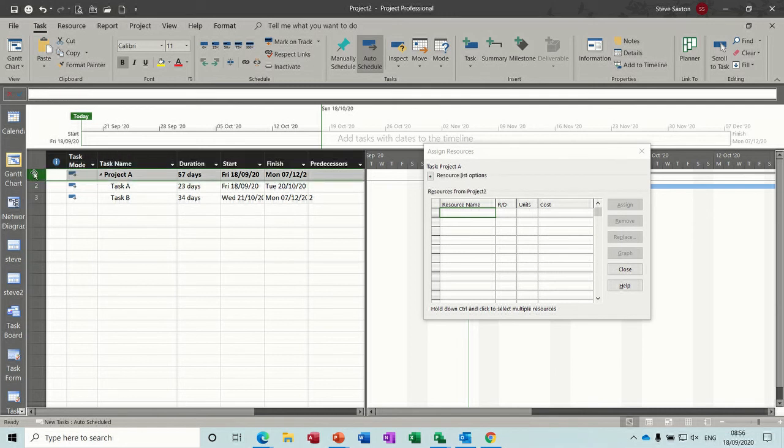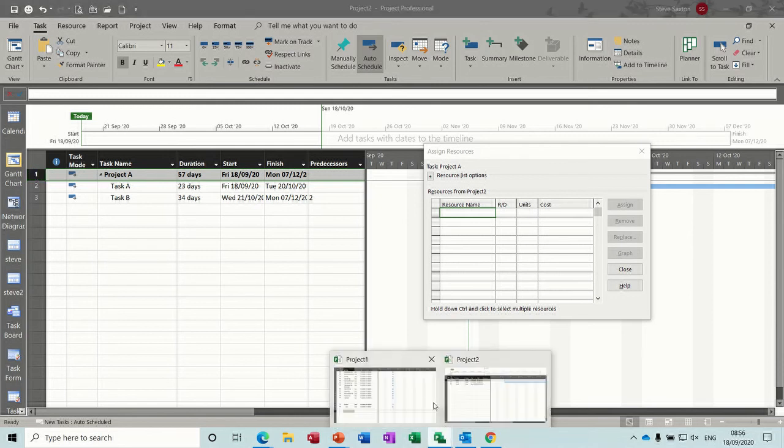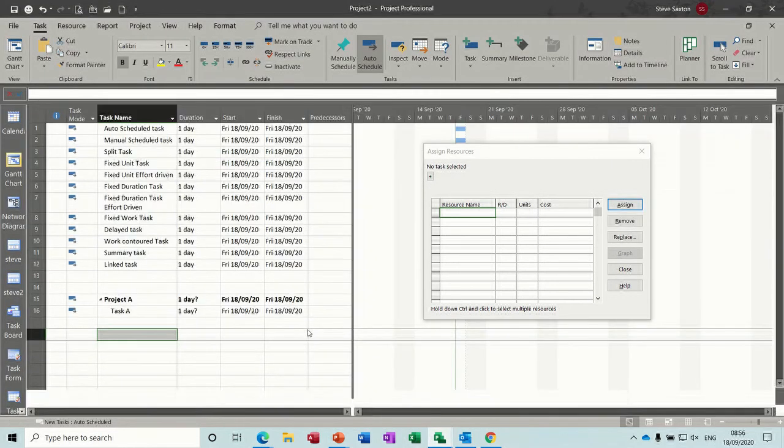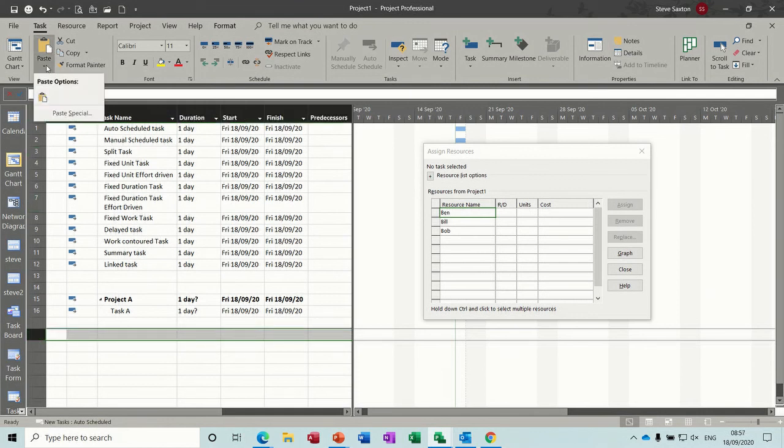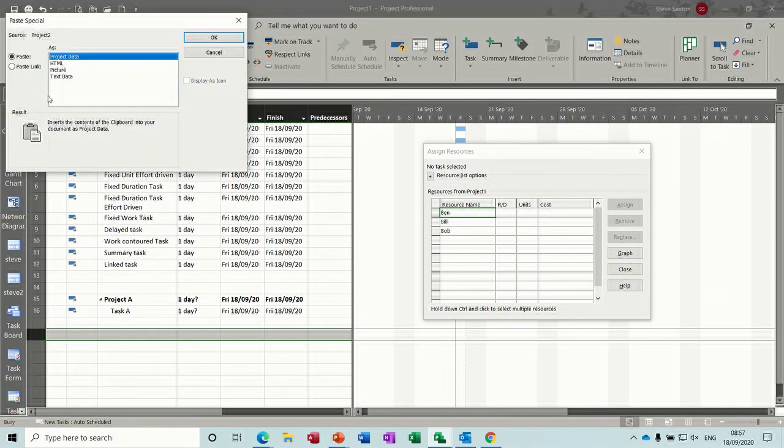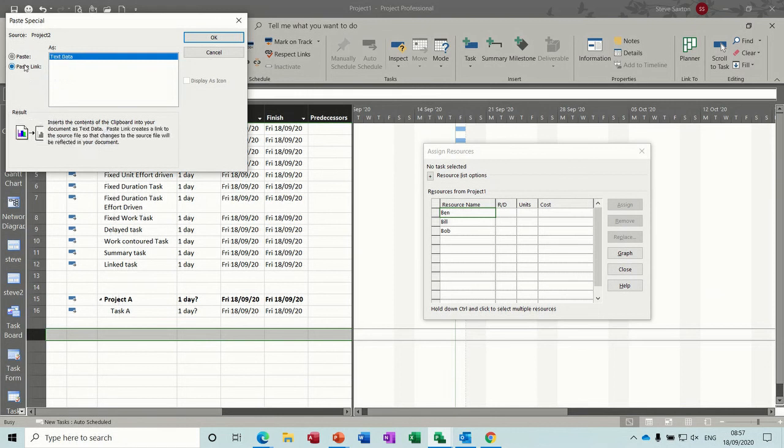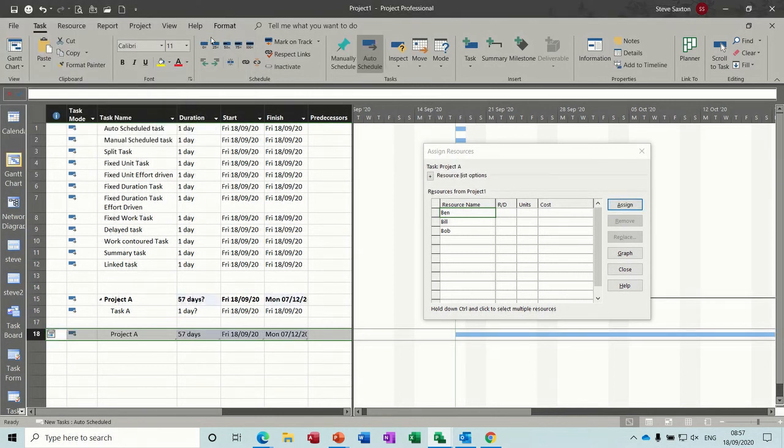So you highlight that, you select copy, control C, you go back into the other file, and you select the row, and you go to the paste button, and you select paste special, paste link, that's the key, paste link, OK. And it should come in 57 days.